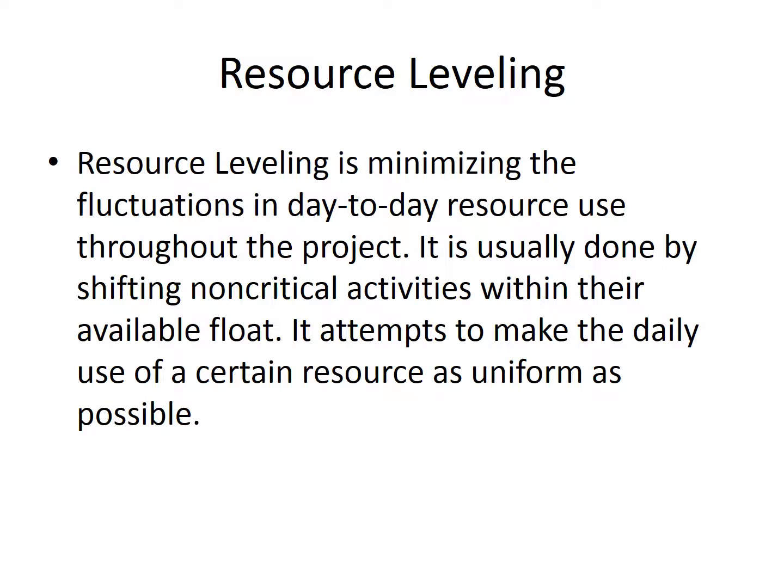So if I've got these heavy spikes in labor need and I've got nowhere else to put my guys for the second half of the week, a lot of times the way people will level resources, if they've got something that's non-critical, they will position crews on different sites on different days. So maybe I go Monday through Wednesday to a site over on the east side of town, and maybe I go Thursday and Friday over to a site on the west side of town. And that way I'm not having everybody do these gigantic spikes like 60 hours Monday through Wednesday and then nothing on Thursday and Friday.